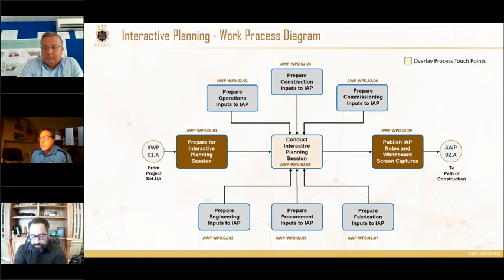Well, part of that integration, part of the things covered during the IAP sessions, is the identification of large and multi-trade use scaffolds, which is a great aspect for saving money on a project itself, beyond just identifying the scope and breaking down and plugging those items into an AWP-friendly WBS structure, if you will.